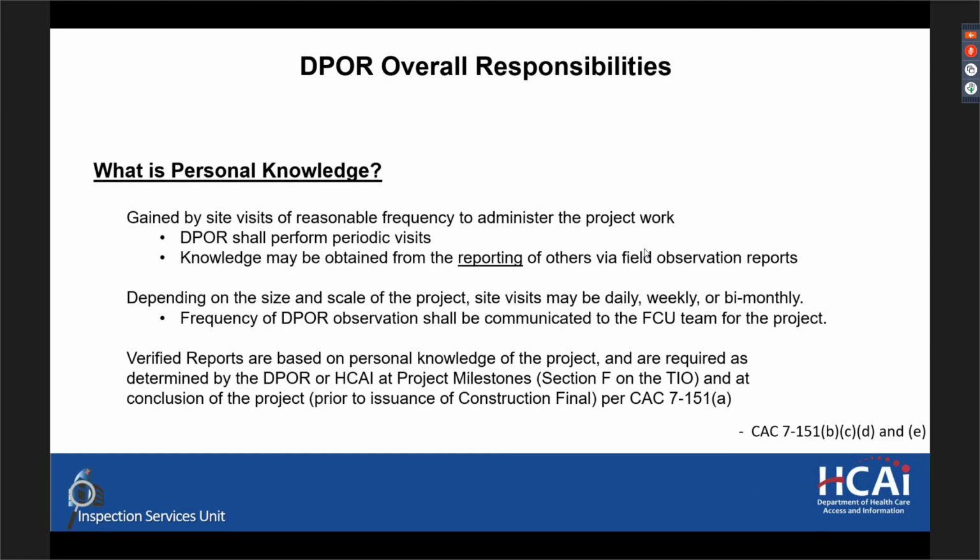So personal knowledge would be gained by site visits of reasonable frequency to administer the project work. The DPOR shall perform periodic visits, but knowledge may also be obtained from reporting of others via field observation reports. Depending on the size and scale of the project, site visits may be daily, weekly, or bi-monthly, or perhaps only once if it's a tiny project.